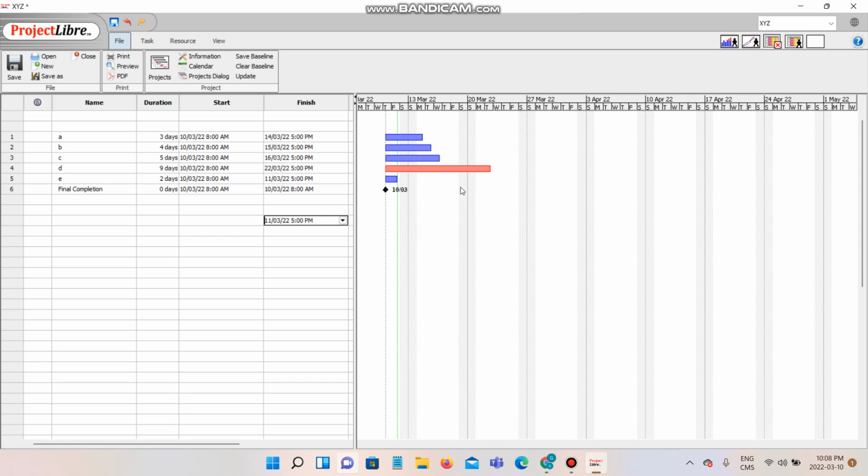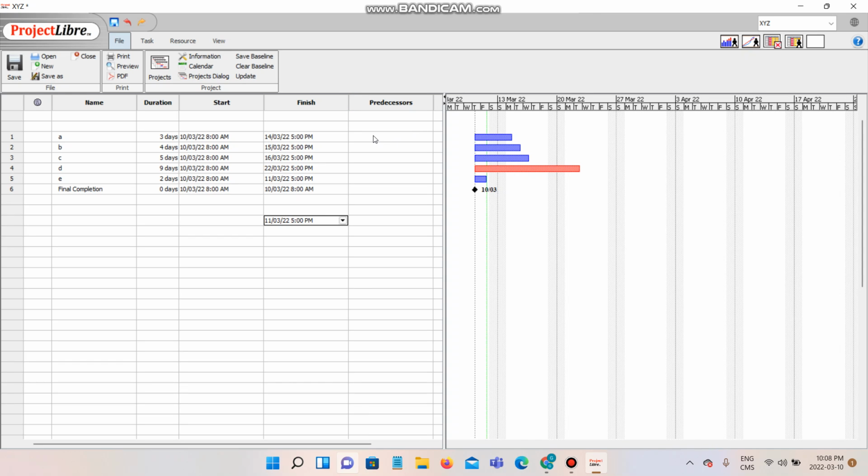to finally get the project done. So I'm gonna establish some dependency or some relation between these tasks, because by the completion of every task, finally our project is gonna complete. There are basically two ways to establish some link between them. Like we can say that task B is dependent on task A. So basically this means that after the completion of task A, we can complete task B.